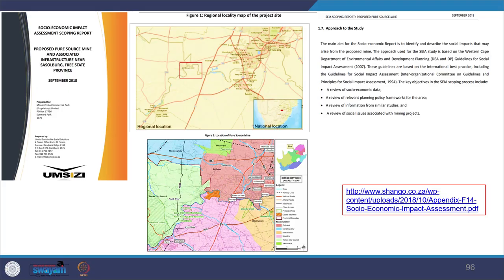You need to be very careful about the timing of the closeout audit, and usually it depends on how complex the rehabilitation and restoration was. If it is complex, the time would be at a later period. Usually it takes 3 to 5 years after the land has been acquired, but from experience, it can take up to 10 years. By the time people settle in a new place, it takes 10 years for closing or handing over. So looking at some of the examples, I've also given you the link here.